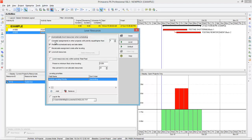Another option is to consider assignments in other projects with priority equal or higher than a set value. You can set project priorities up to 100. For example, with four projects, you can assign different priority levels. When the program levels resources, it considers the priority — the highest priority project is leveled first, and so on. This option is also not ideal for me, so I'm going to uncheck it.